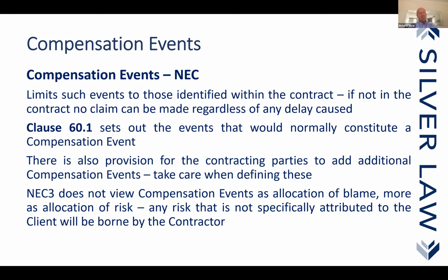If there are amendments, in my experience, it's not generally for the contractor's benefit, it is generally for the employer's benefit, where the employer is increasing the risk of the contractor by placing further obligations on the contractor and/or by deleting certain of the compensation events, and also by adding in additional obligations as to procedures, again increasing the risk on the contractor. So be aware, do read option Z.